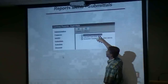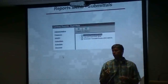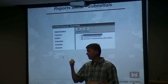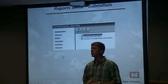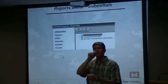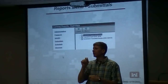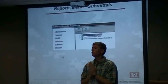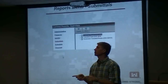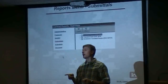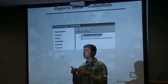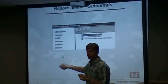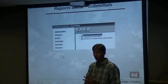In order to link those submittals to the schedule activities, I suggest you print the submittal register and go to the right-hand column and sit down with your project manager or the scheduler and handwrite exactly what the schedule activity is. It should be the first activity of the schedule pertaining to that. So if it's rough electrical and you're going to start the first floor rough electrical in area A first, that's the activity that should be synced to it — not the last activity in that sequence of rough. It should be the first one, because all the submittals should be done by the time you get the first one done.